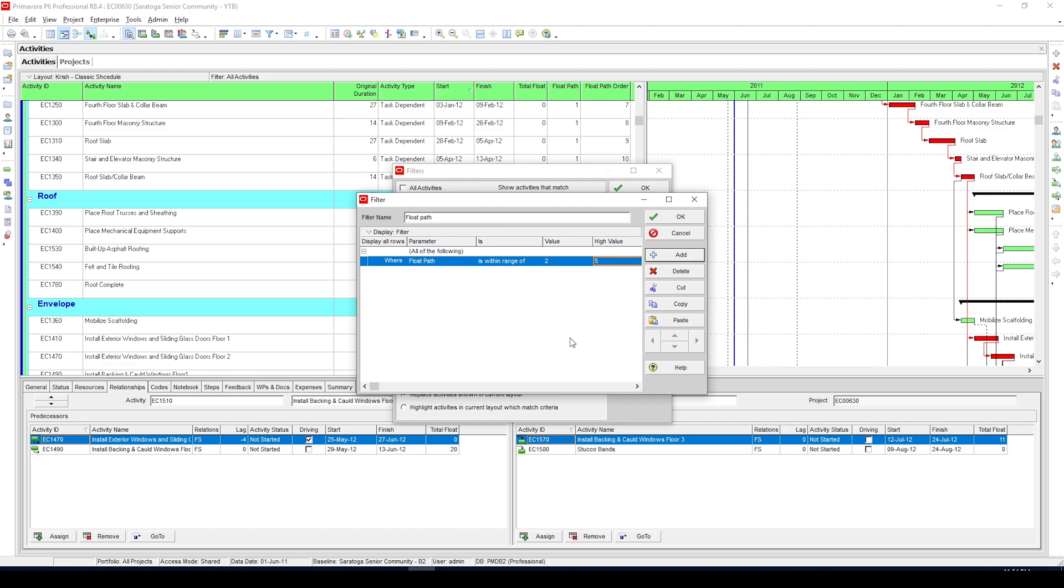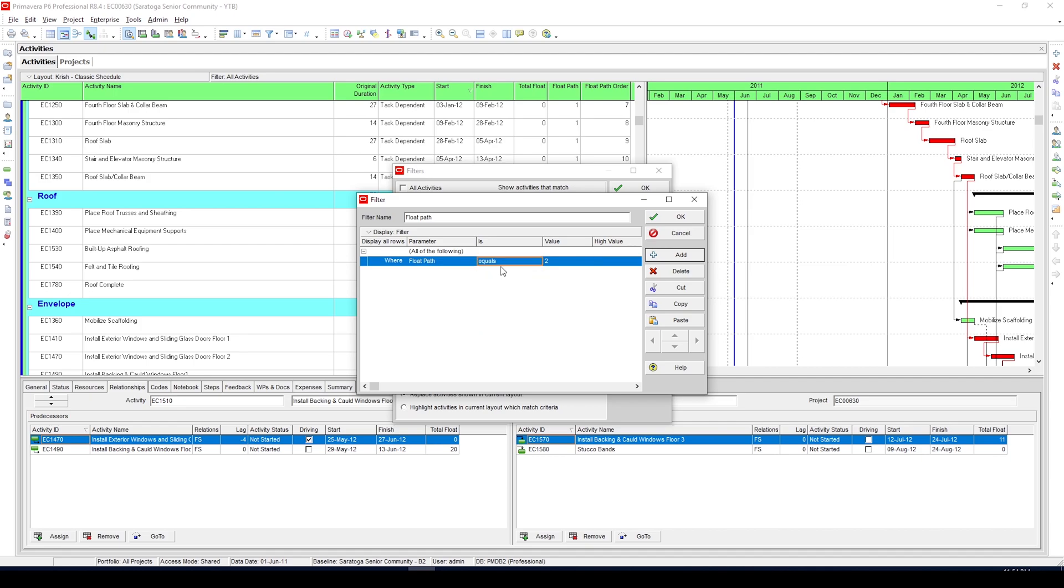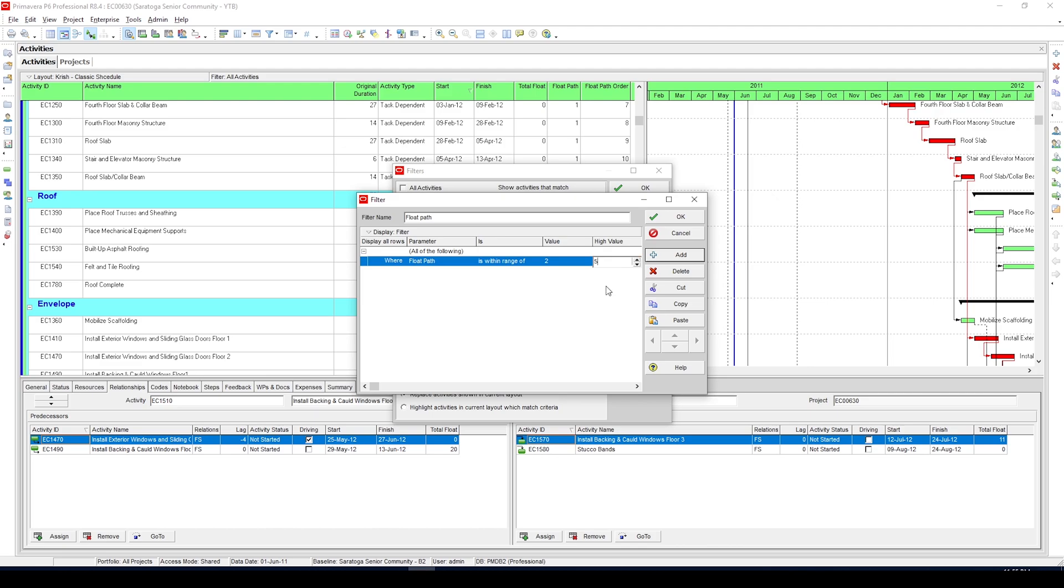Now one thing to note is after we apply this filter we only get near critical activities. If you specifically want critical activities, you can create a filter with float path equal to 1, as all the critical activities fall under float path 1. Or you could click on the link above and watch the video where I talk about getting critical activities using float path method.